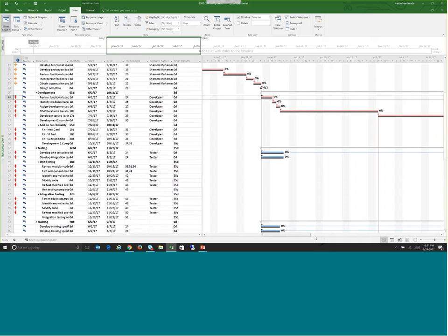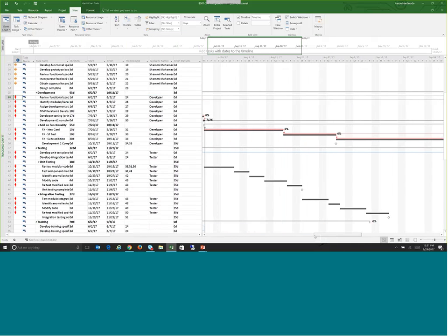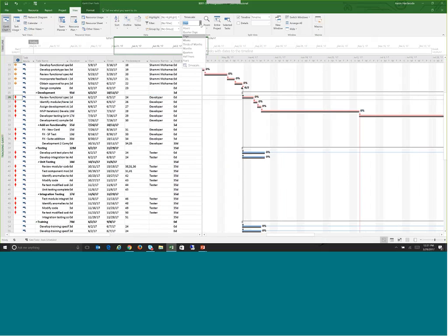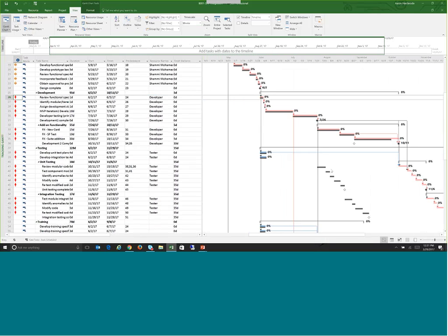So here I can see a gray bar that slipped well out from where the baseline of that task originally was. And again, if I change my time scale and zoom out a little bit more, let's say to weeks, it'll be a little bit easier to measure. So here I can see how far these have drifted off merely by the inclusion of some new 25 days of new deliverables in my schedule. Now this is great for tracking against the original baseline. Again here, the baseline value, red, this is a task on the critical path, and this is where it currently is fitting in the schedule, so I can see how far it is from that original baseline time slot.